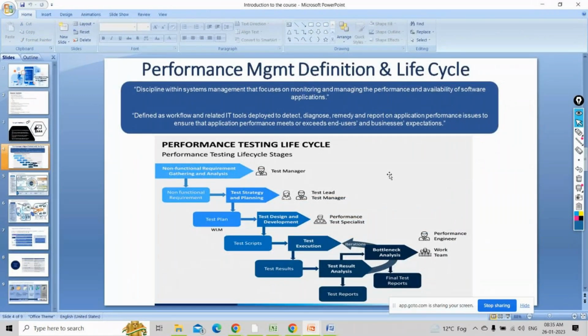So you have to tell them that that cannot be possible, that will require additional effort. You have to create the scripts, do the workload modeling, execute the test, and find the issues, and that will take extra effort. So if the client is being too insistent, you have to tell them about the effort calculation that has been done. When we are designing the SOW, as a part of the SOW, you sign off the efforts, saying okay, I'll be requiring this much effort.